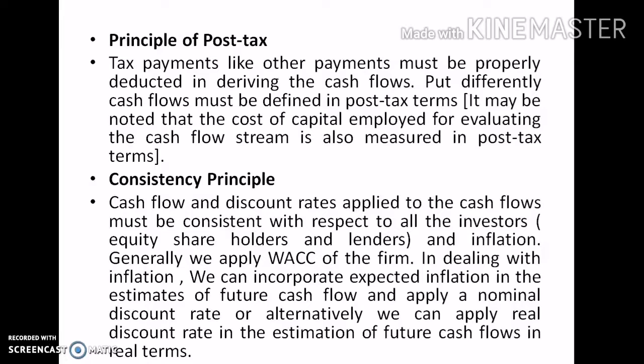In dealing with inflation, we can incorporate expected inflation in the estimates of future cash flow and apply a normal discount rate, or alternately, we can apply a real discount rate in the estimation of future cash inflows in real terms. Let us move on to the calculation of cash flow estimation based on its components.